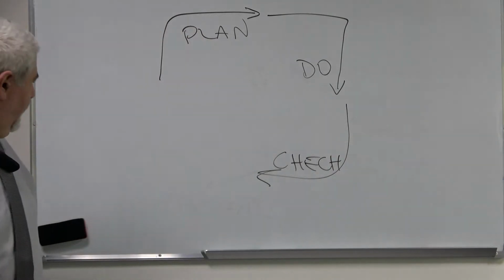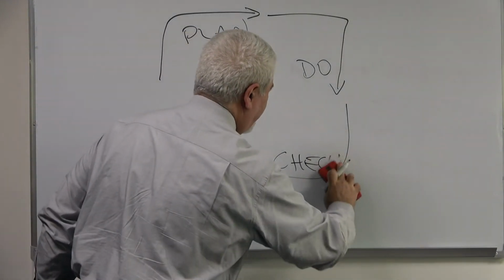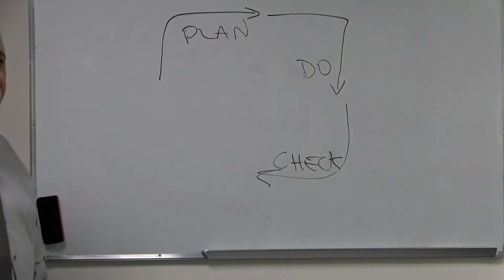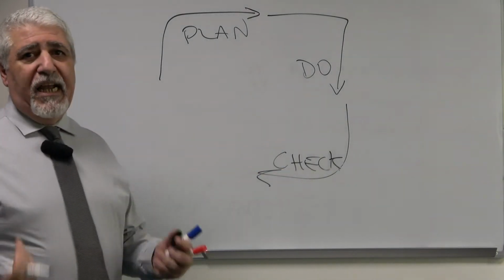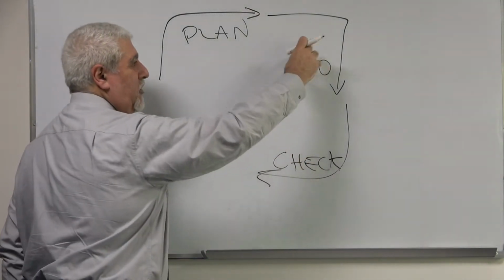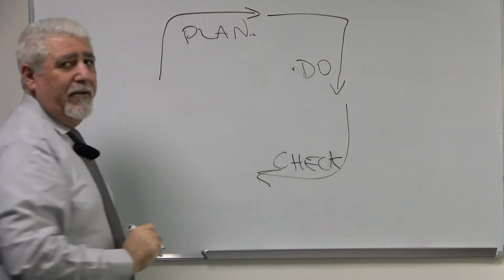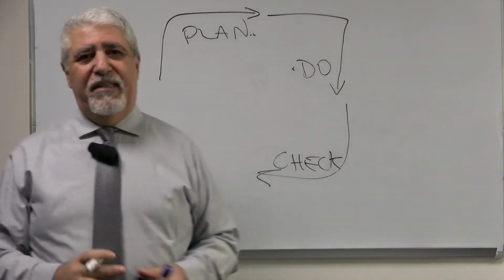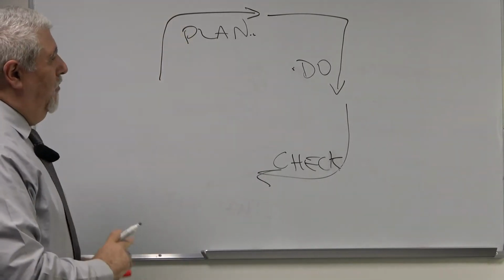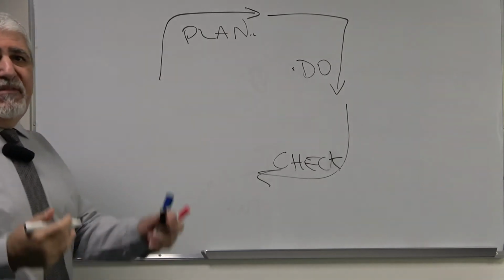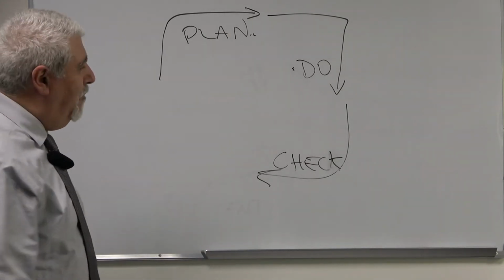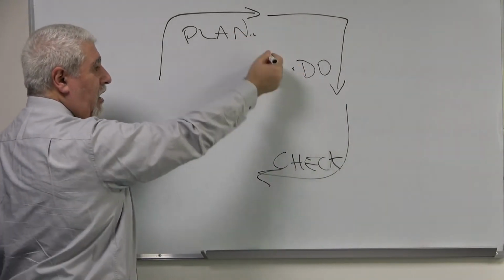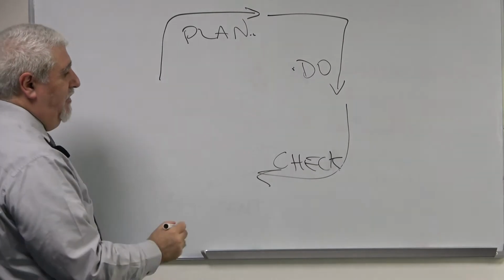as you do work, you need to check. Checking is about confirming that you are working according to plan. And obviously, since life has Murphy's law that might come and visit every once in a while, we might deviate from the plan. We might have deviations or variances from the plan, which we discover by checking to see if we are working according to plan.